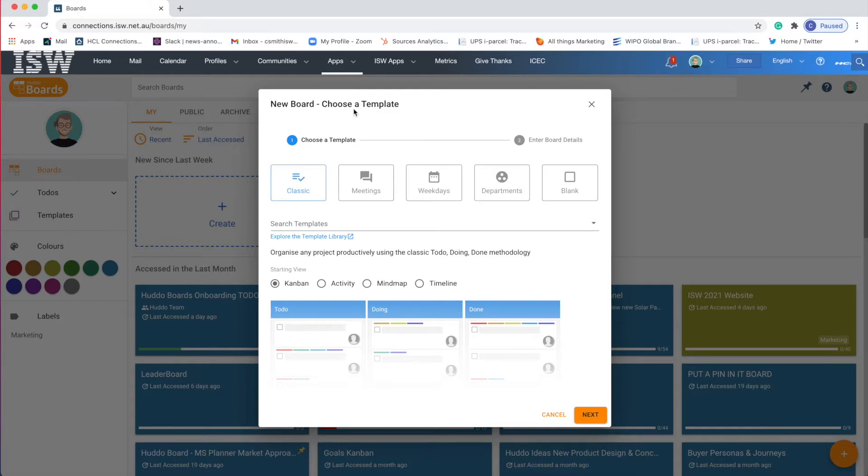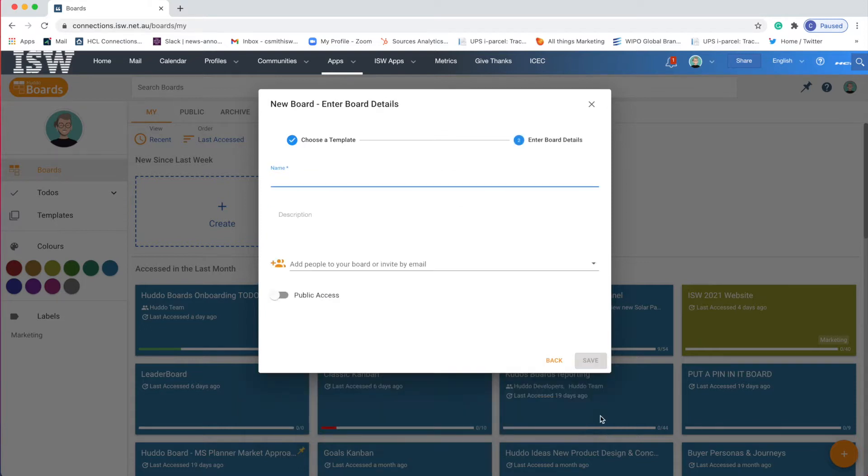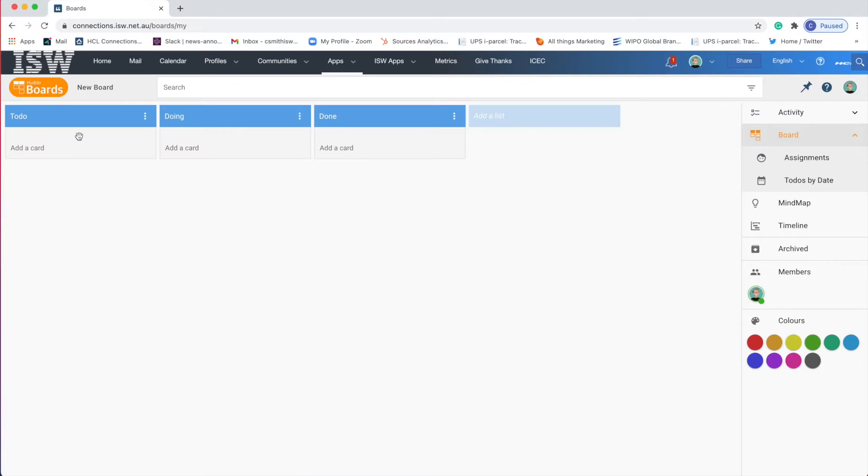So my first tip is to start very simple. Classic is a simple to-do list with just three columns for to-do, doing, and done. Kanban is just this concept of columns and cards where you can drag and drop tasks to different columns. So this is where I suggest you begin and I'm going to call this new board. So here are my three columns.